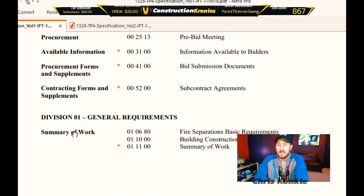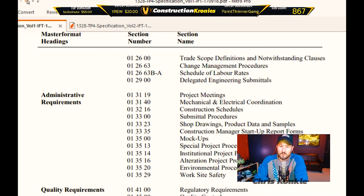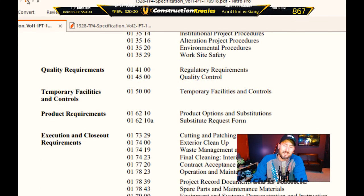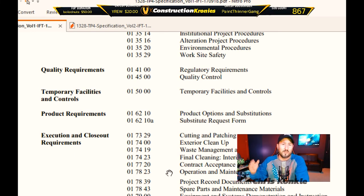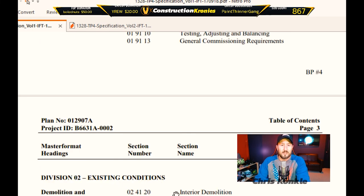The general requirements include summary of work, administrative requirements, quality requirements, and so on. This is important to know if you're bidding or pricing a job because you need to know how much time it's going to take you to do the administration side of the job — there'll be meetings, documentation, safety documentation, all these things. You need to know this stuff to price jobs so you know how much it's going to cost you.